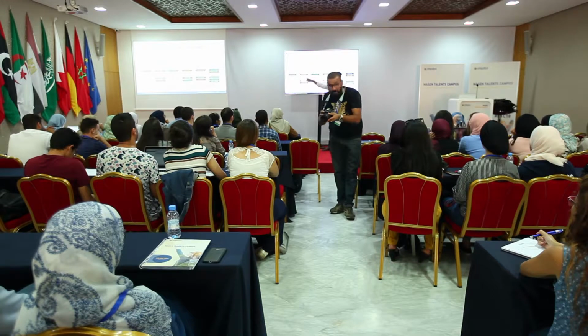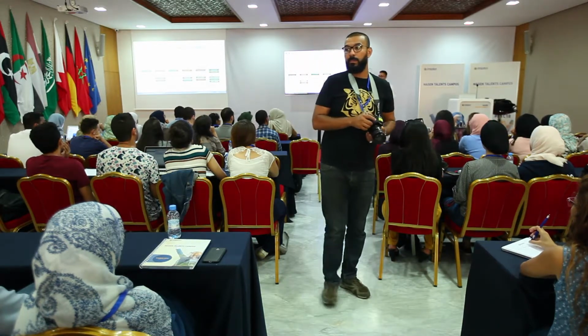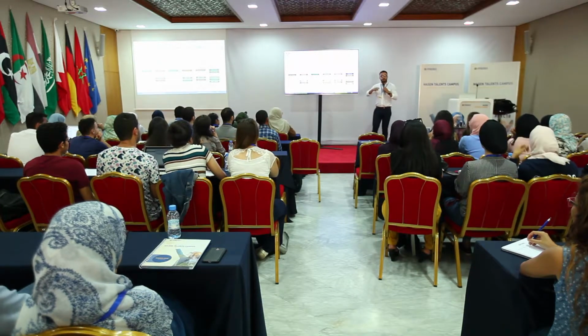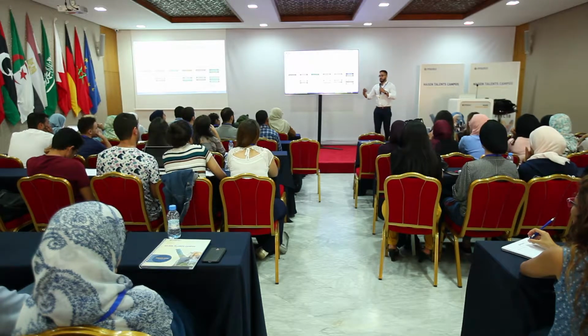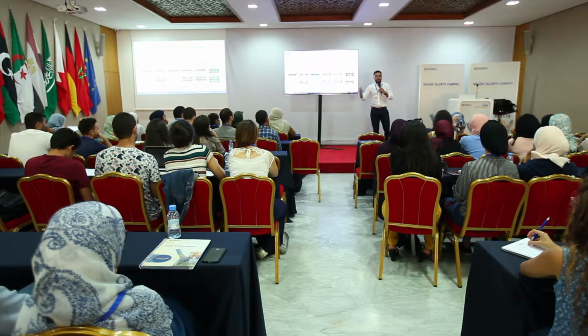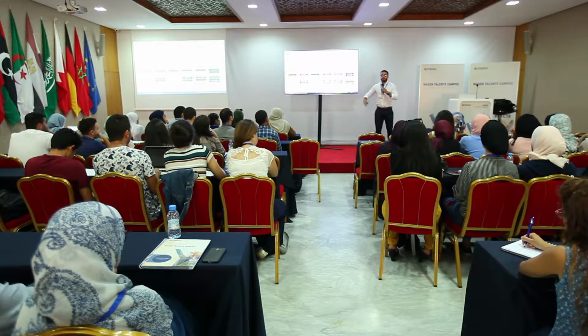Another reason why I bring this up is that it's not the same level of detail that you need for designing an operation. For proposing a project, you do a proposal here, then here, then here. The closer you are to financial closure, the more specific the power plant design needs to be, and then it's locked. This is what we're putting money on. At the very beginning, you just have the pre-design, to see if it's interesting. There's not so much detail on the components and so on. And actually, during construction is where you have the final design, because it's what you can test.